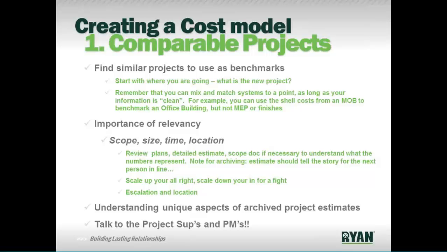If you're comparing office buildings, you may want to equalize for the fact that one building may have had constant volume rooftop units for the mechanical system. Another one may have geothermal. Another one may have VRF. You just want to be balancing out those in terms of looking at the relevancy of your comparable projects. And if you find one project that most closely represents the project you're creating, you will probably weigh more heavily on that project as it relates to being the most relevant in terms of scope and size.